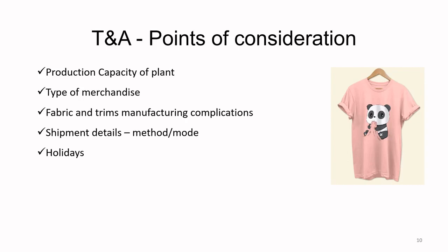If you are going to do the production from February to March, just take out the national calendar and see how many festivals are there in the month of February and March. And then accordingly you can do the planning. Your planning is going to be far more accurate.